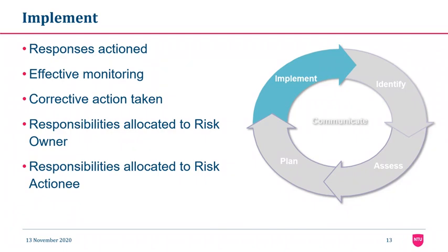Step 4 is implementing the responses. The main things to decide in this step are who is going to monitor these risks and who is going to carry out the planned risk responses. So this is the step where you take your project risk register and use it to monitor, track, and review risks. In reality, not all risks can be eliminated. Some risks are always present. We should make sure that we keep a close watch on all risk factors and monitor their situation to make sure that we are on the safe side.